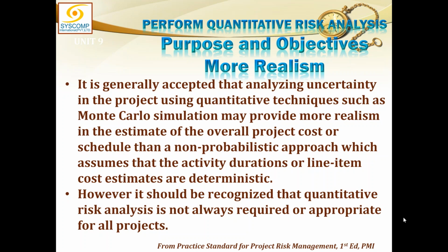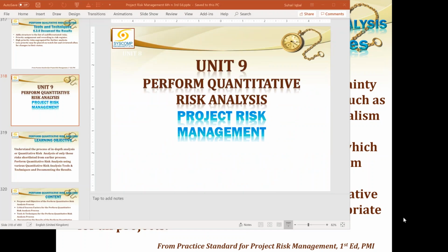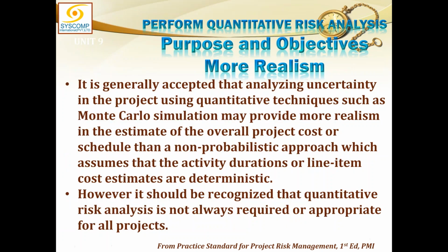How early can this activity be done? We can bring it back. Your boss is forcing you to do this activity earlier. So how early can you do it? So one deviation back means 3.83 minus 1.5. So approximately this much is fine with me. I can somehow try to compress my schedule to bring it back to that level.